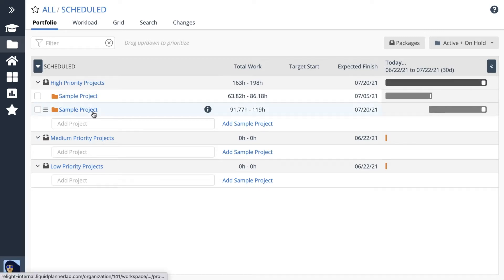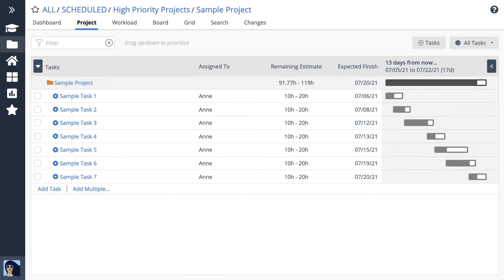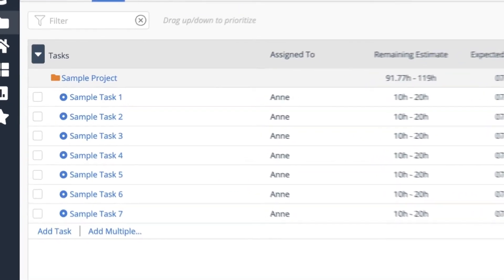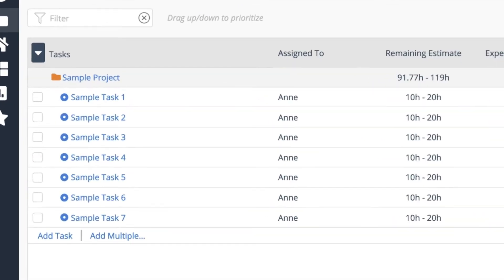Click on the project name to have a look at the task list. Tasks are essential for scheduling. The scheduling engine needs to know who's doing the work and how long it could take in order to calculate expected start and finish dates.